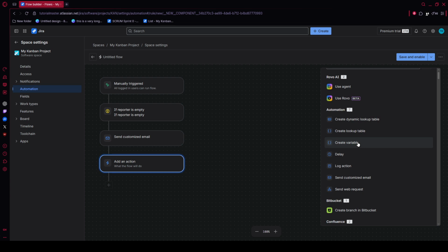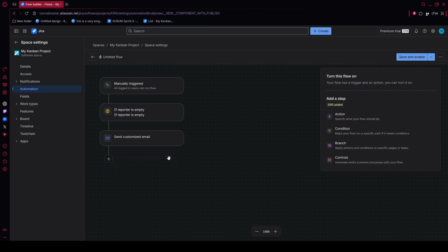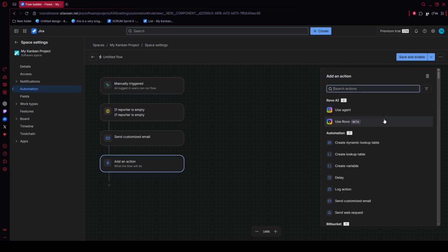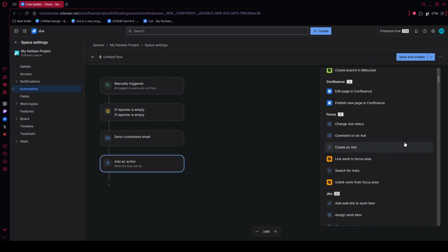If your recurring workflow includes multiple smaller steps, you can extend the automation by adding subtasks. Click Add Component underneath the main Create Issue action. Choose New Action again, and then select Create Subtask. Enter the specific subtask name you want Jira to generate. You can repeat this process to build out a more structured, recurring workflow when needed.